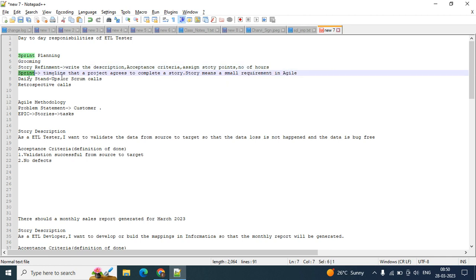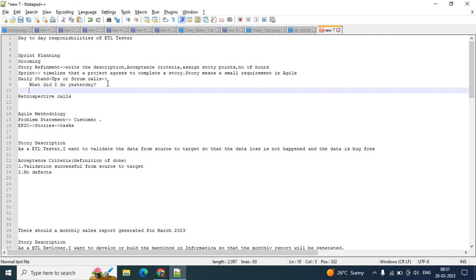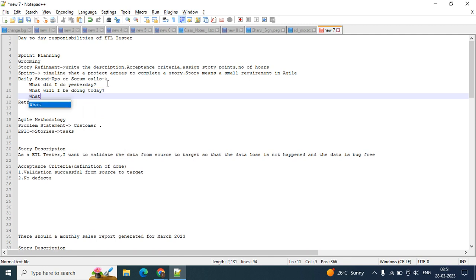In sprint, I told you what it is. So in the daily stand-up, what happens? This is the template we follow. What did I do yesterday? Then what will I be doing today? Then what are my impediments? Impediments are nothing but blockers. What are my impediments or blockers?